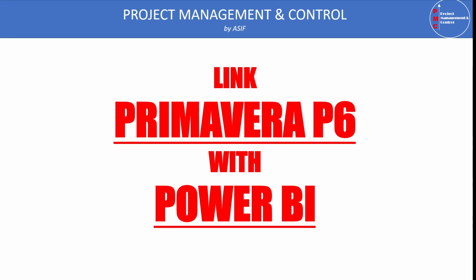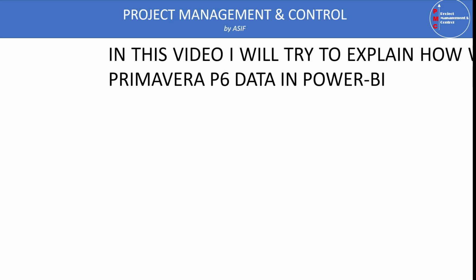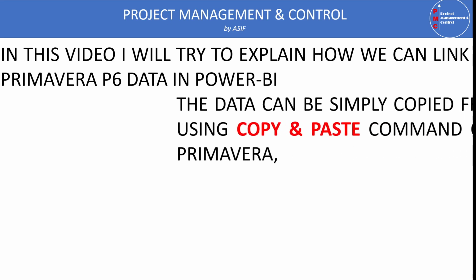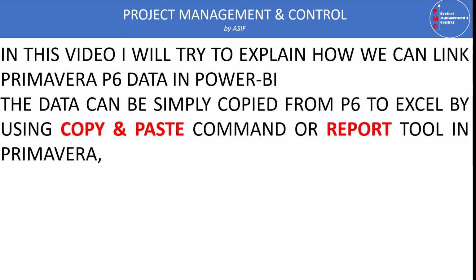This video tutorial I'm making is to demonstrate how we can link our Primavera P6 data with Power BI. If you have the program already prepared and it is resource and cost loaded, and we want to link it with Power BI, the simplest way is to copy the data from Primavera P6 to Microsoft Excel simply using the copy and paste command.